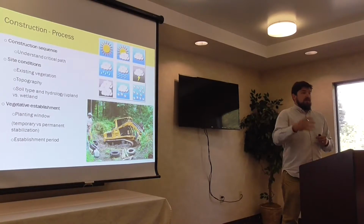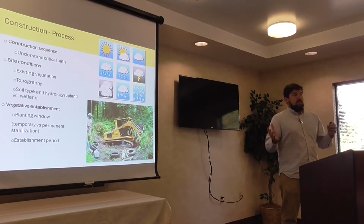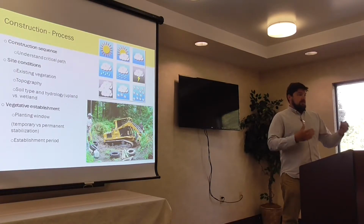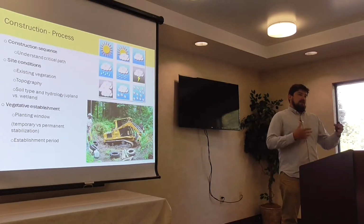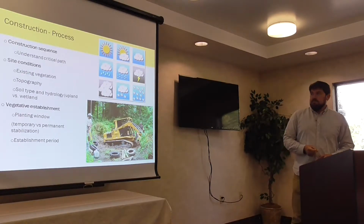all of your work within the floodplain is low ground pressure equipment. You can't just go in with the big D8 or something and tear it up, because you're going to compact the soil. Not everyone's used to that. And we're always working with different excavators. So we have to sit down, and there has to be an open line of communication between us and the people who are actually doing the work, so there aren't any problems in the long run.